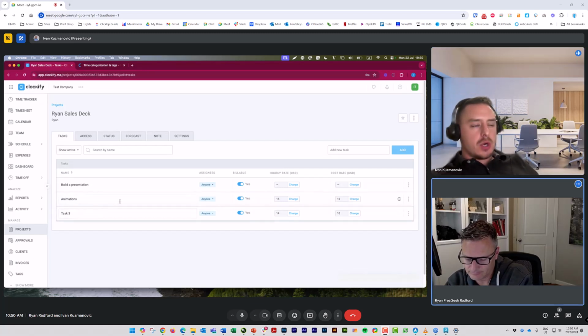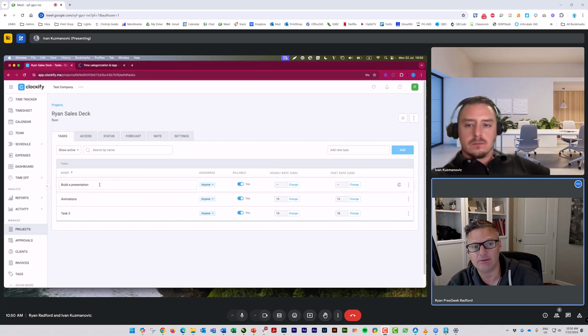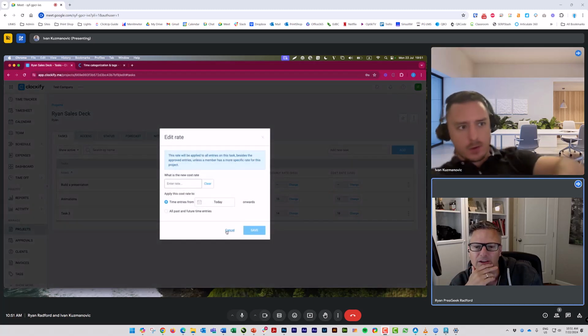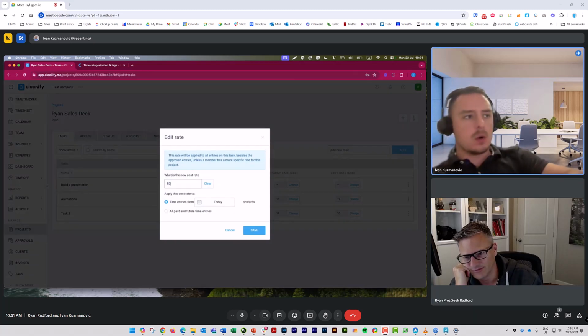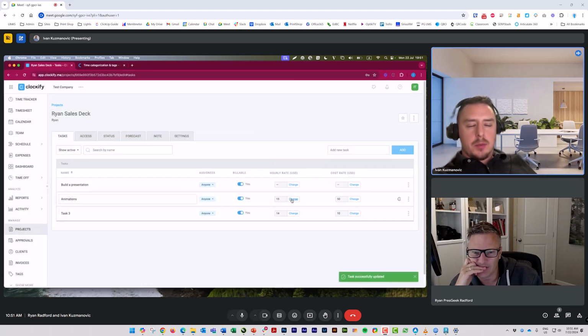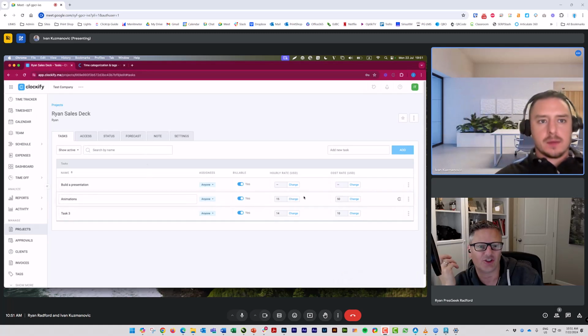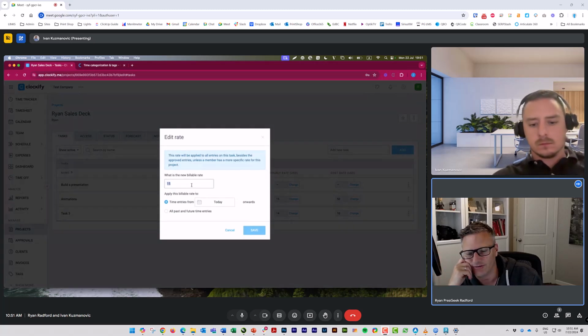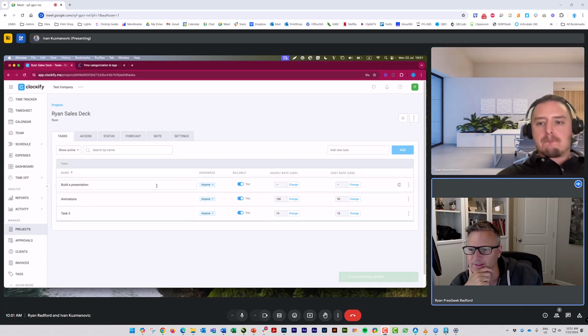what would you like him to be paid when he's working on animations? What would I pay him? Let's just use a big number. I would pay him $50 an hour for doing that. Okay, so $50 per hour you would pay him for animation. Yeah, 50. And what would be his billable rate? So how much would you earn from your client? Let's just say I charge the client $100 an hour. So every hour I'm going to make $50 if that was the case.